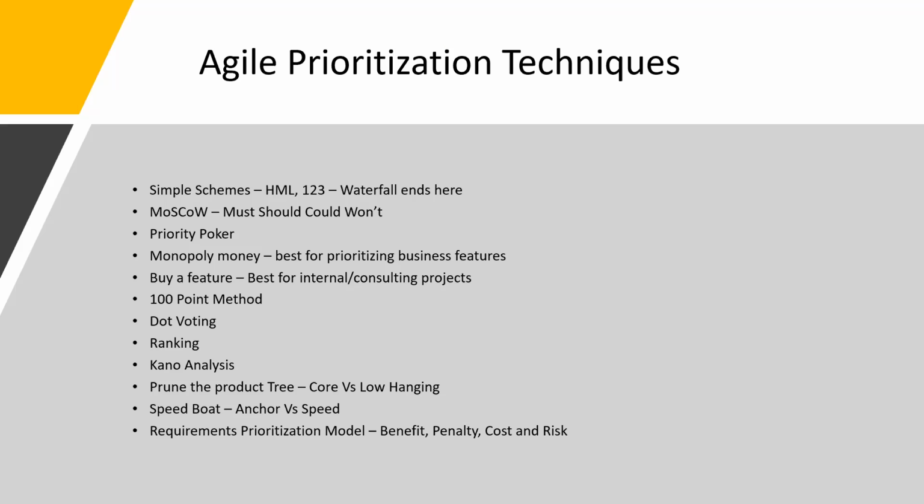Ranking, yes, we use stack ranking, similar to 1, 2, 3 ranking, but stack ranking is usually done at sprint level. Next time when I do a slide, I should probably put in a matrix and say which are best at what time. Ranking is best at sprint level during sprint planning, and even during sprint review. These 3 methods are best because they are easy to do and easy to understand.